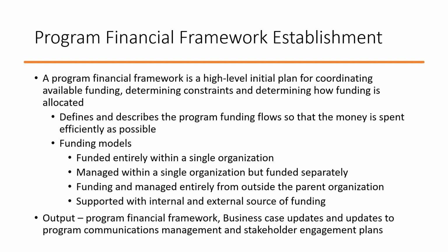You might also have updates to the program communication management and stakeholder engagement plan, because depending on the internal or external source of funding, you might need to add a backer or your venture capitalist as one of the stakeholders, and plan how the communication is going to be with them. All those things will be an output of this financial framework.